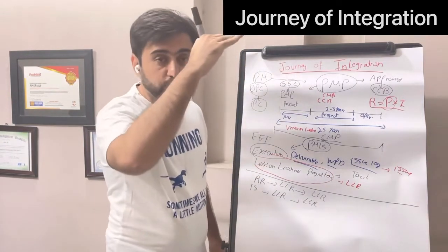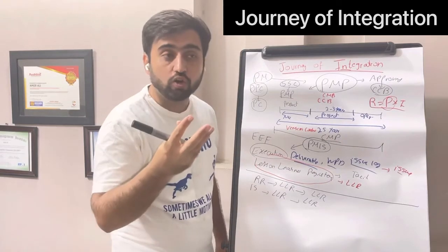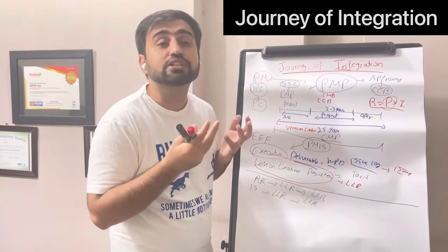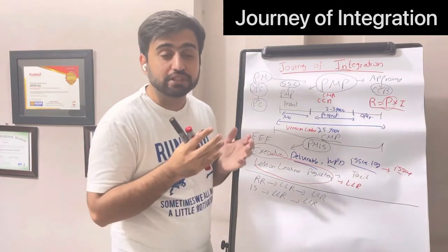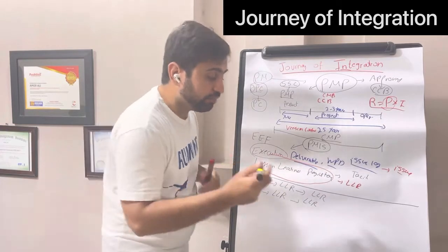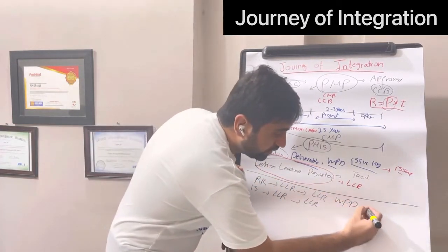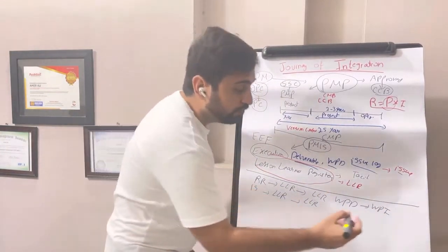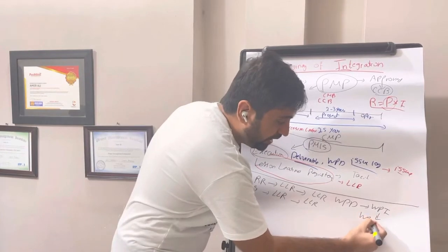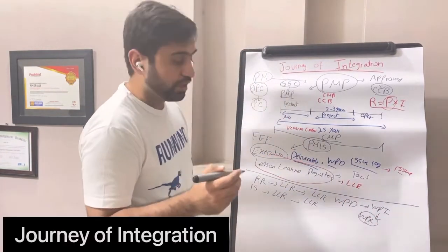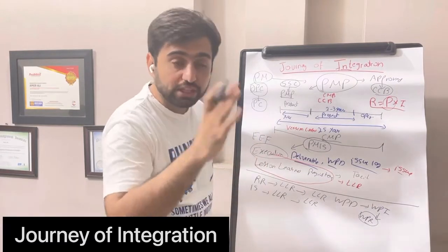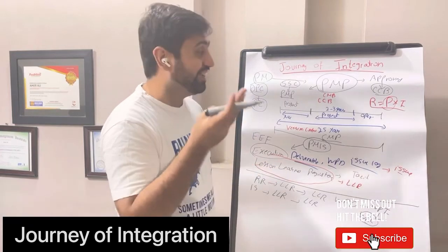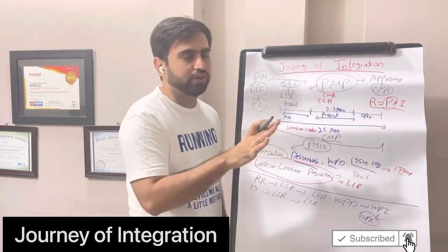It goes to all monitoring and control processes, to all scope, schedule, where everyone contextualizes this data and work performance information gets produced. Work performance data is produced, it becomes work performance information. Each department produces their own individual information and the project manager combines it and produces a work performance report. So that's also an integration. All the changes are approved, all the reports are produced, work is done, plan is approved. So a lot of work in integration.